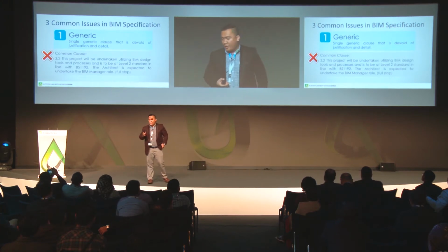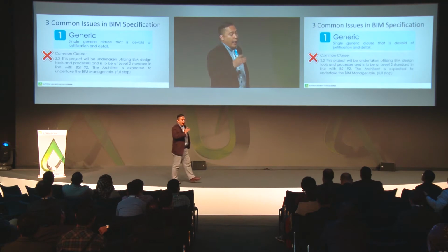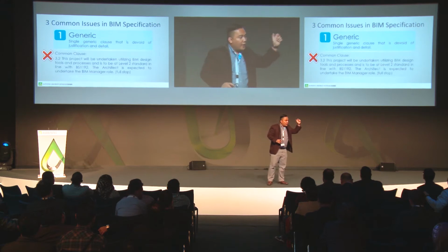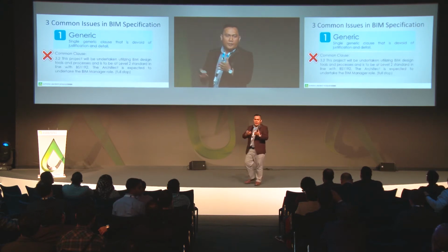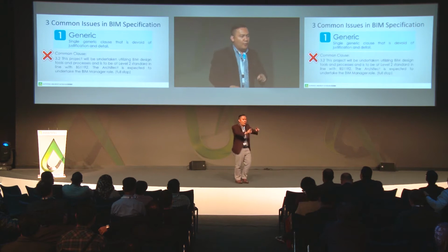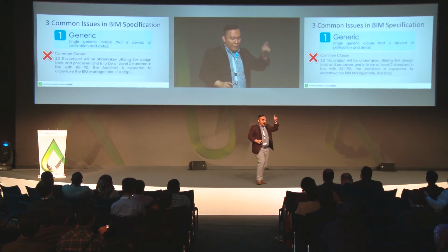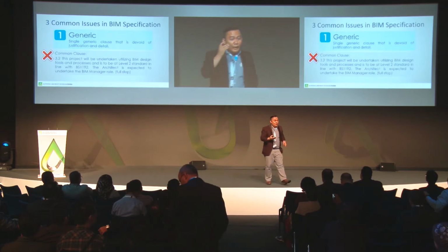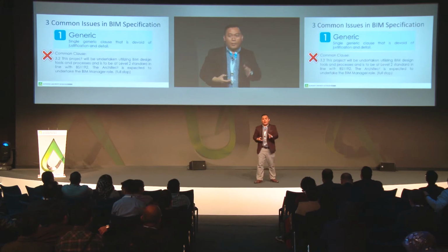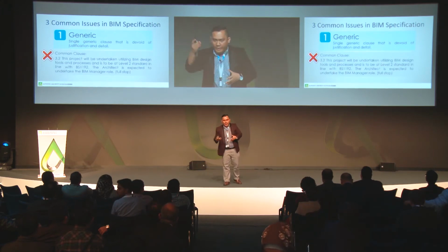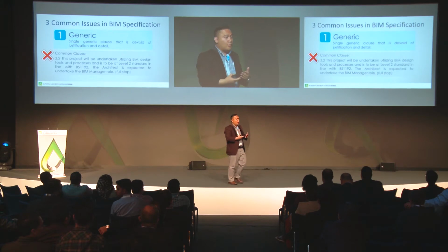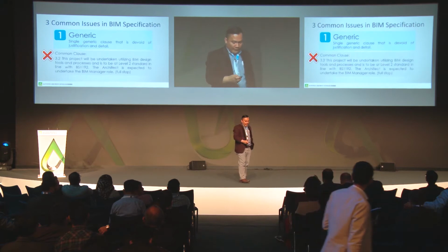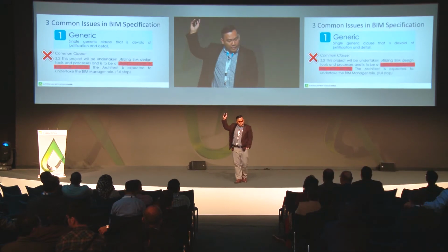it is actually a single generic clause that is injected into the project specification, devoid of details and justification. For those of you who are familiar with a project specification that is contractually bound, you have a project specification of, let's say, 200 or 300 pages, and there's only one paragraph mentioning that you have to use building information modeling. But you don't know how to fulfill these requirements because there are no BIM deliverables explained or structured there. And there are also no phases or timeline for when you should deliver those deliverables. And this came from a real project requirement.